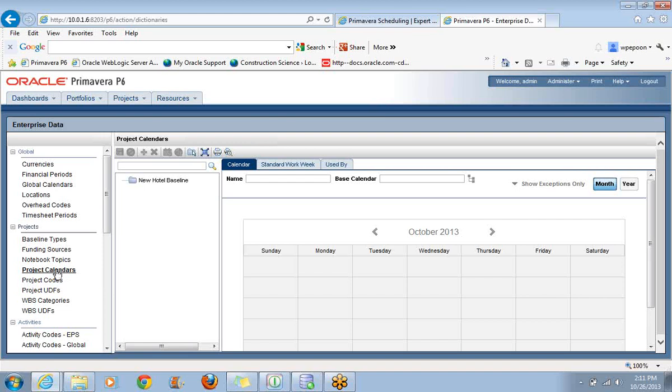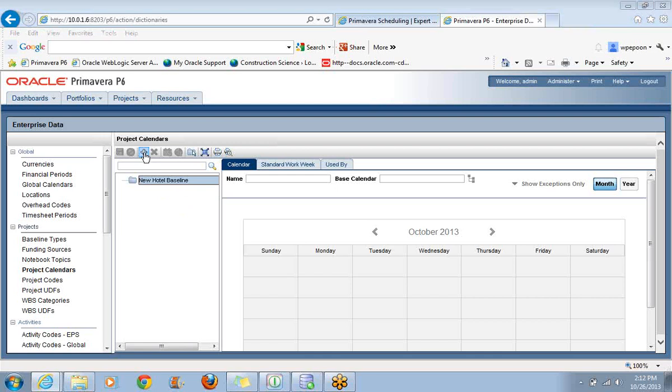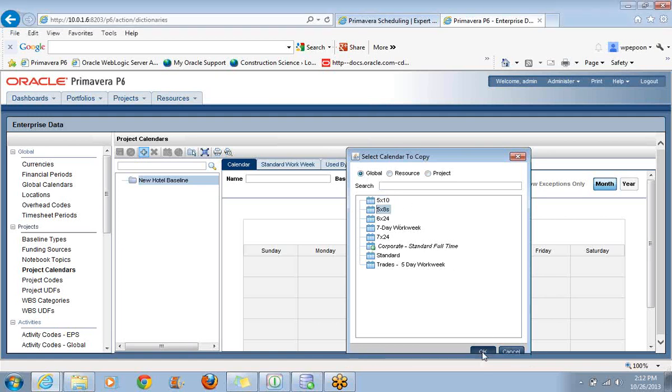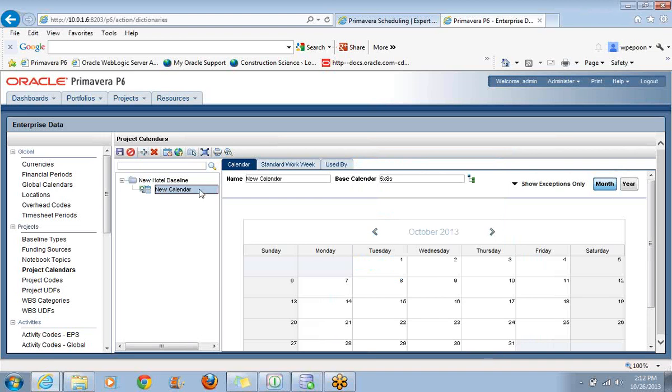You'll notice we have Global Data, Project Data, and other things. When we're talking about calendars, they've split them up. So you find global calendars only right here, then we have to go to a different list and that's where we'll see project calendars. Keep in mind, when you're trying to create a project calendar, that project needs to be open. It's the only way to set up a project calendar. There you see my project. We have to highlight it. Once I highlight it, Primavera will then allow me to add a calendar.